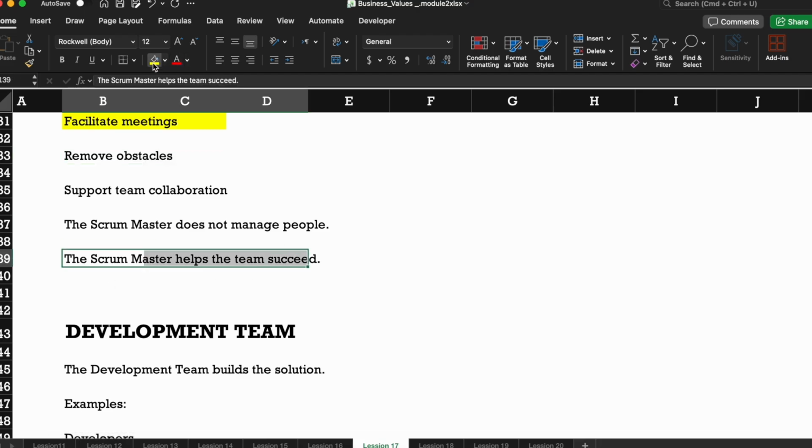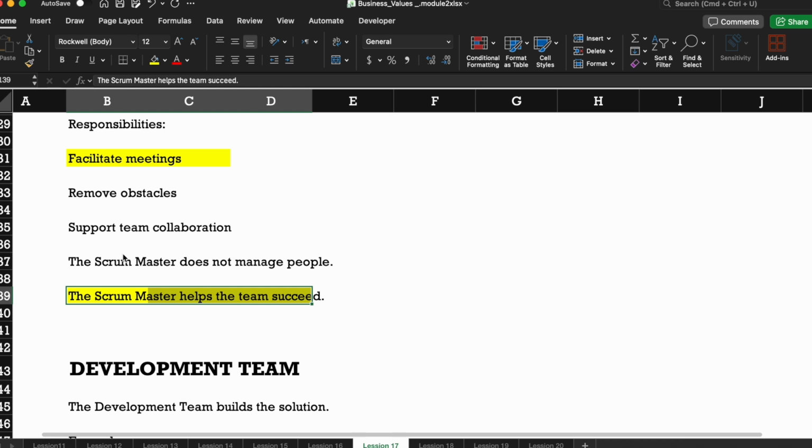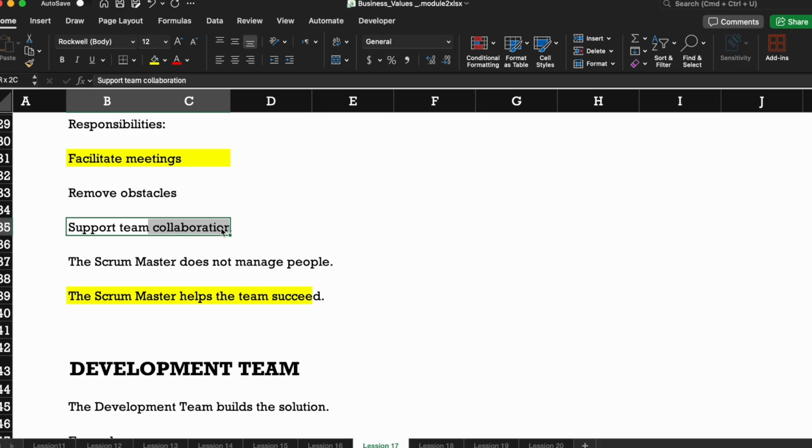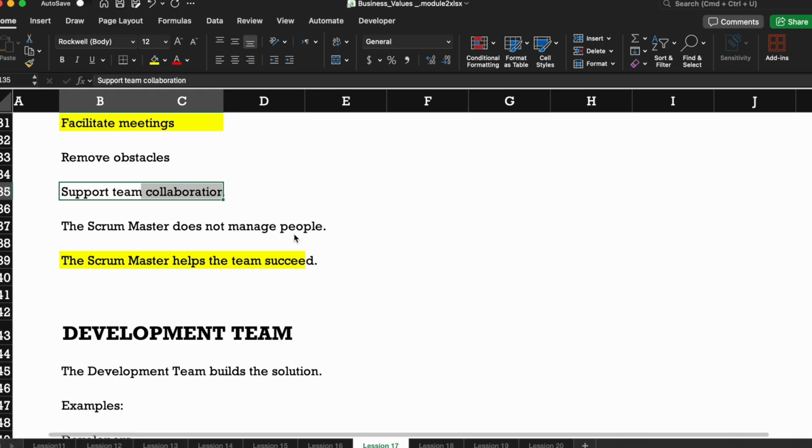Okay, that's it. So there will be a stand-up call, and in the stand-up call the Scrum Master will ask what's the update. If you have any blockers, you can let us know. Let the Scrum Master know. You can copy the Scrum Master. She, or he, can go back to the right owner and ask for help to remove that blocker.